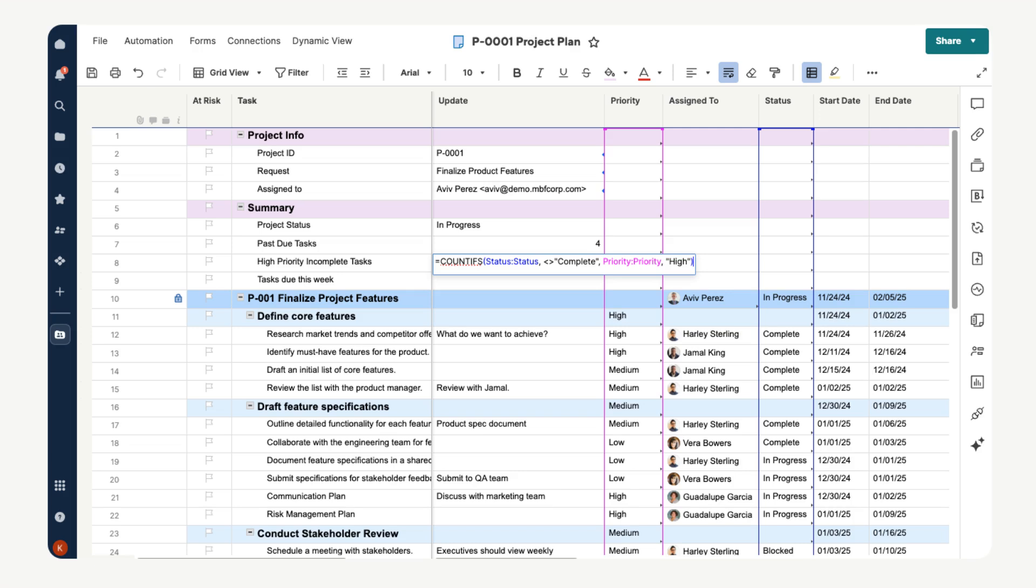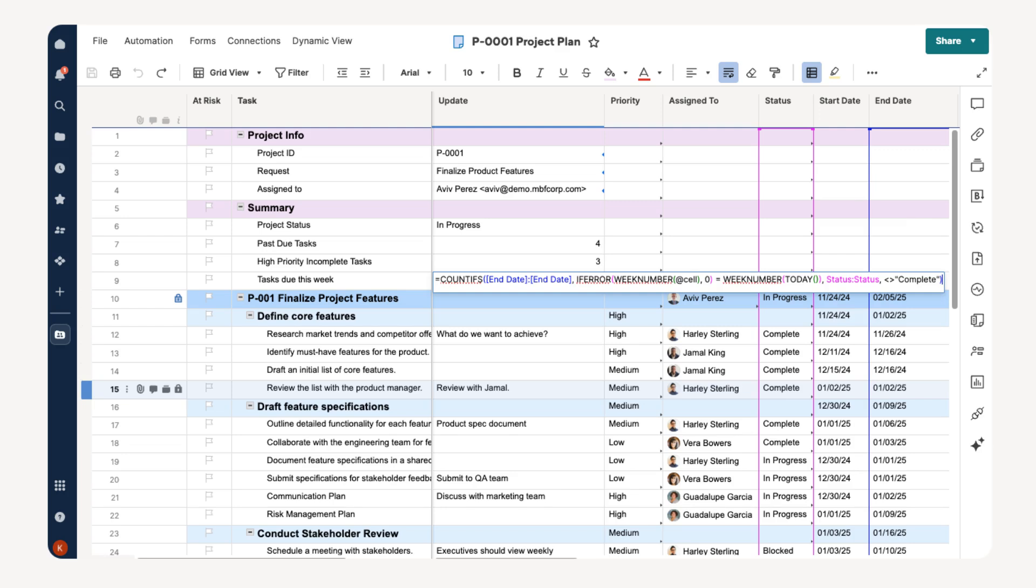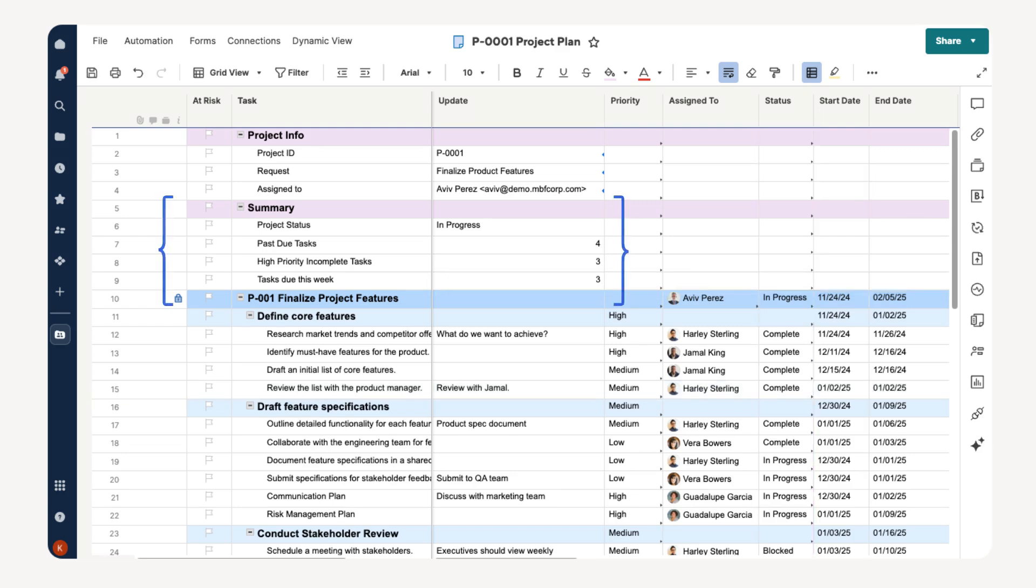Next fill in the other two formulas. We also want to count the number of incomplete tasks that are high priority, and we want to count the number of tasks due this week. Now we can use the summary section of our project plan sheet to quickly find key data.